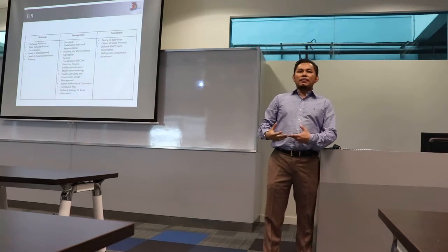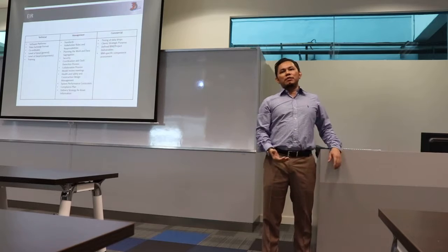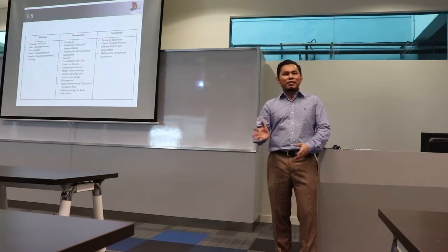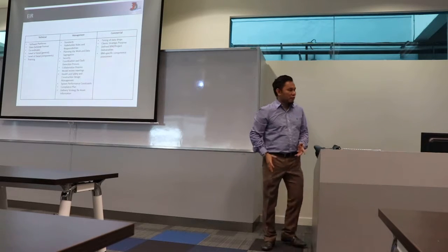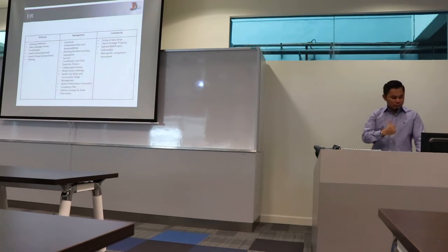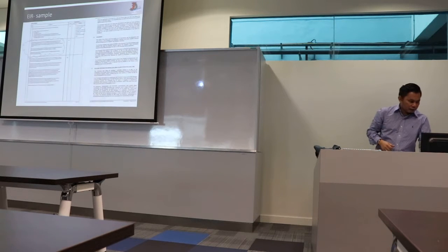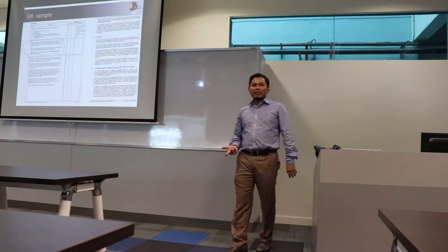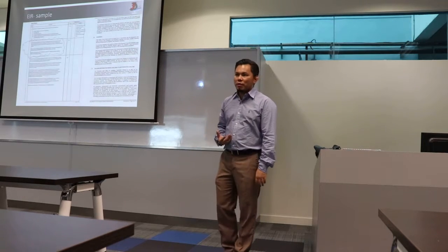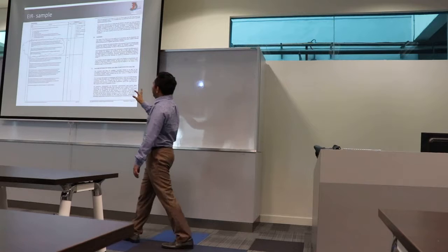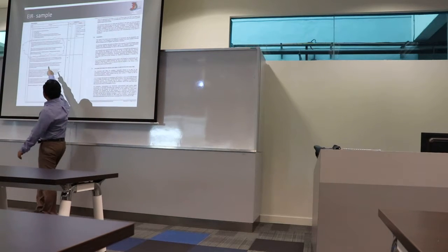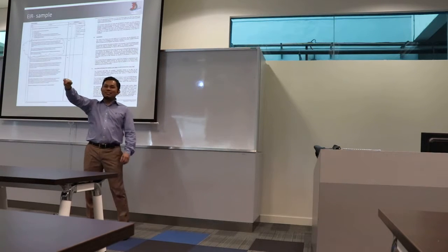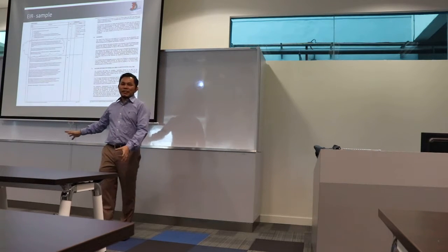That's why when we started another project, we changed the TOR, terms of reference, and built it into the contract, so that we can tackle the project deliverables. So these are some of the EIRs, not very good ones. We see this a lot in project requirements. Sometimes it's just one clause like that, clause number 7, that is my BIM requirement. It opens a can of worms. I don't know what it is.